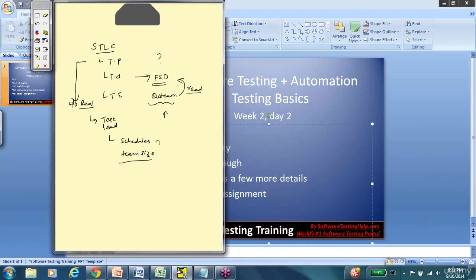So this is high level information that is pretty much a subset of the information that you'll find in the project plan. The test lead does not have a lot of activity here except to go through the project plan, pick out the sections that are relevant to a testing activity and incorporate them into an initial draft of the test plan. So there is not a lot of work for the QA team member. We'll talk about what a test strategy is also, but at this point there is not a lot of input that the QA team can provide, and in some circumstances the QA team might not even be formed at this point. There might just be the QA lead.